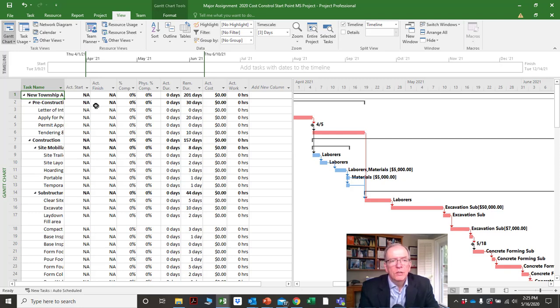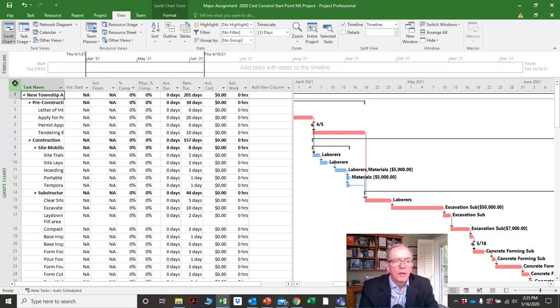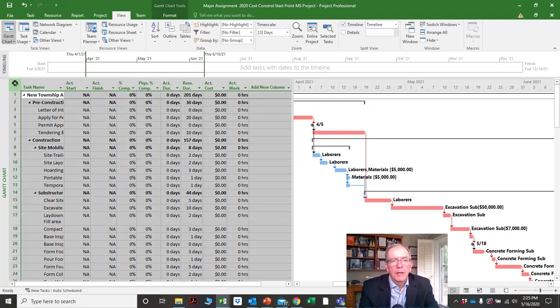You only fill this out when you're actually updating the schedule — things have happened. This is really looking at what has happened and putting in actual timeframes for the work that's been going on.